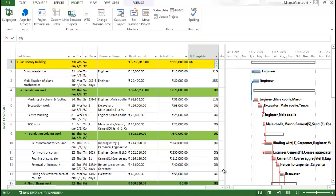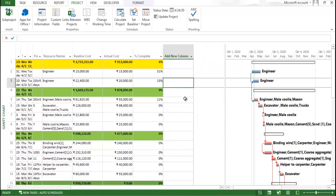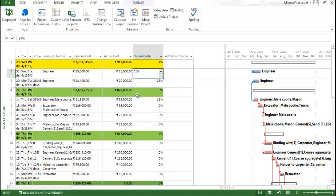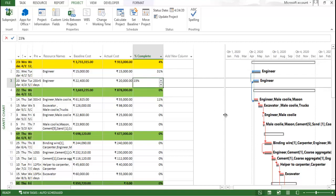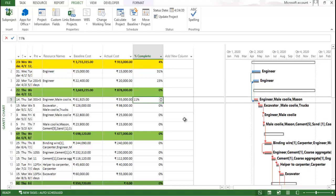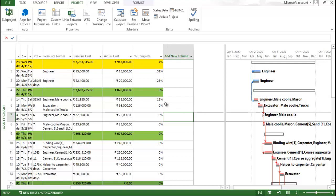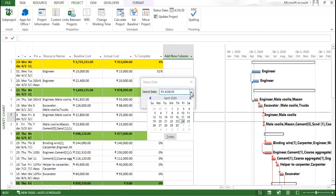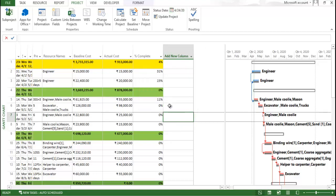Now I would like to add percentage work complete, which is a very important portion. Right-click and add the 'Percentage Complete' column — this helps you assign how much work has already been incurred. For example, 31% for one activity, 23% for another, and 11% for another. If you want to update the project, click 'Update Project.' To set a status date, select the 23rd from the dropdown and click OK.